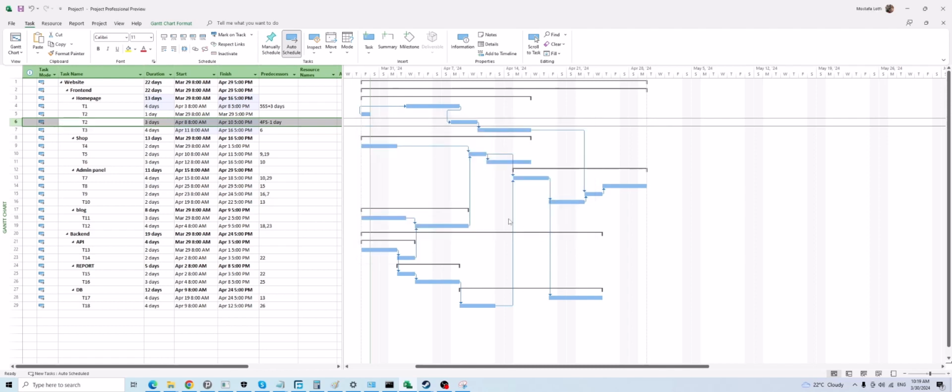And honestly, based on my experience, you need to try to avoid these constraints as much as possible. Otherwise, when you want to update your plan, it will create a problem. It will make it harder for you to maintain your project plan. But if it's the nature, if it's the limitation, if it is a force inside of the project, you have to define it. But I'm telling you, try to avoid it as much as you can. But if you can't, then you need to define it.